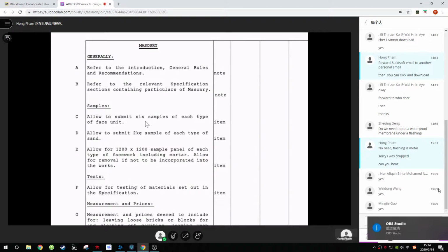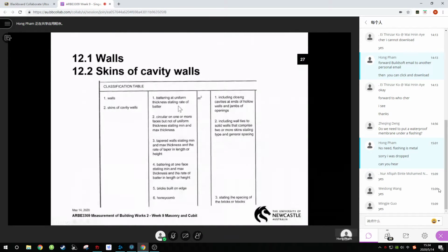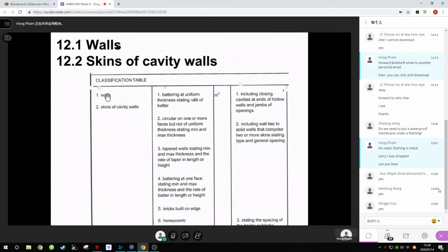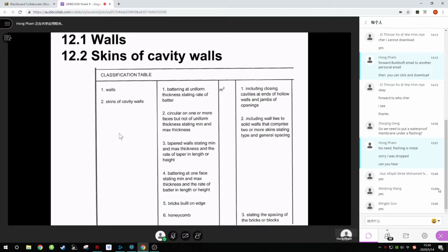So on the slide, I always use the term solid. When you see the first items come in, common brickwork will be the first item that you measure. Heading, common brickwork, and then I'll start off. First item will be 110 solid walls. I know the method just says walls, but I say 110 solid walls, and then there are no disputes or not knowing what it is. When we talk about over there on the very right-hand side, closing cavities, that's when you've got